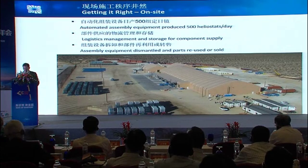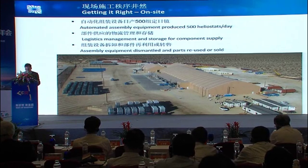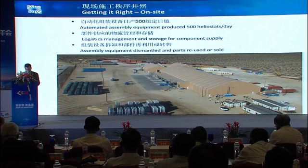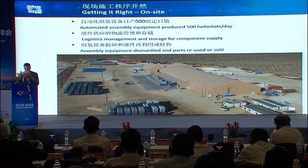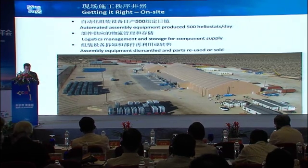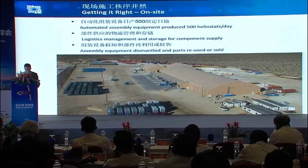We used modeling tools to make sure all the materials came in and out without hiccups or interruptions, including how the heliostat containers were moved throughout the site. With the data from the models and feedback from traffic and logistics, the team redesigned the area to allow for stacking of heliostat containers. Choosing specialized yard equipment meant that containers could be moved more easily in the smaller space provided.